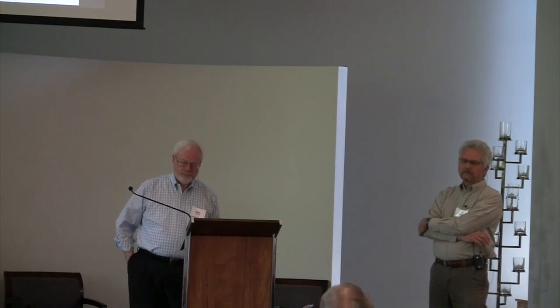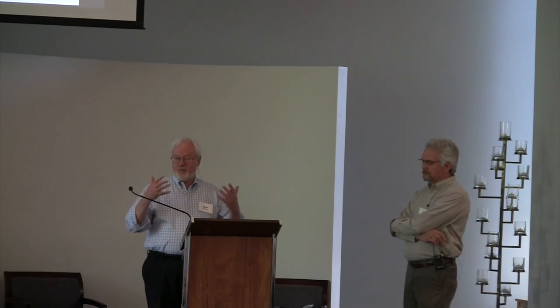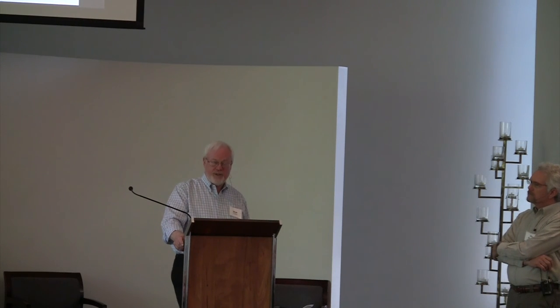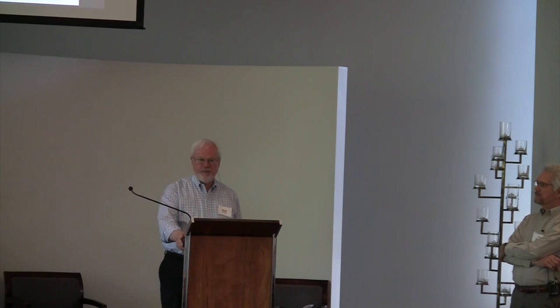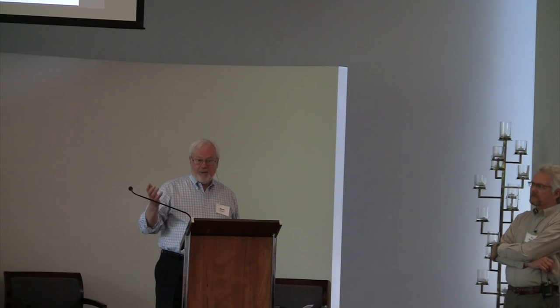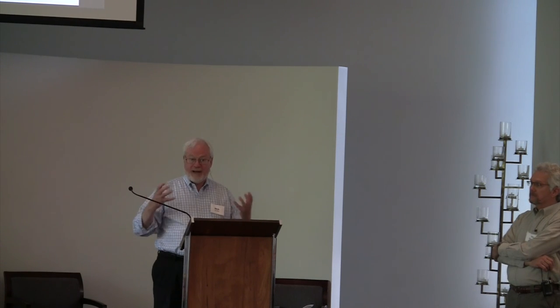I know at one point there was some thought about possibly putting a labyrinth in the tile in the social hall. Where does that stand? If there's a plan that we want to do, and Reverend Hurt and Jim Shettle say we've got to go get a bid for this, we can go get a quote. We did talk to McCarthy initially about it, and it's not a simple thing in the sense that every piece of vinyl has to be cut perfectly, and it would probably double the price of the flooring installation. I know there's been suggestions of doing it. I don't have a directive to do it, let's put it that way.